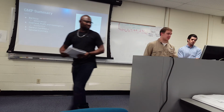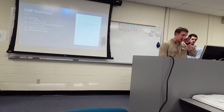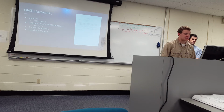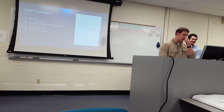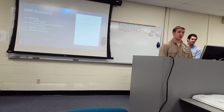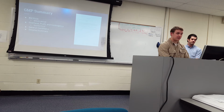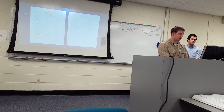So here we have our GMP summary. We'll start off with our bid price, and our bid price is right now listed at $33,497,855.47. And we have an overhead and profit contingency, which is 15%. That comes out to around $5 million. It's listed there. So here we have listed our proposal form, just to verify that that is the actual proposal price that we did turn in to you guys.